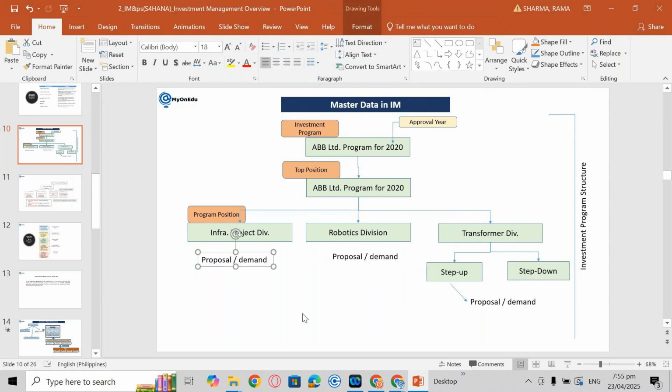So first of all, this demand will be submitted, and then it will go for analysis. It needs to be understood whether it is aligning with my organization's objectives or not, and whether it is feasible or not. So feasibility will be checked from two perspectives: whether it is financially feasible, or whether it is possible to achieve it technically. Then it is going to take it to the next level. So let's say if I'm saying this demand is approved, based on that the planned cost values of that particular demand will be taken to the next.